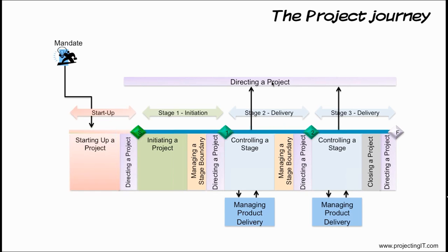If any defined work was not completed or if there are any outstanding actions or unfinished business, then they are handed over to operations using follow-on action recommendations, for example open risks or open issues. All the registers and documents are archived except for the benefits review plan. Once the board has approved, the project is closed.